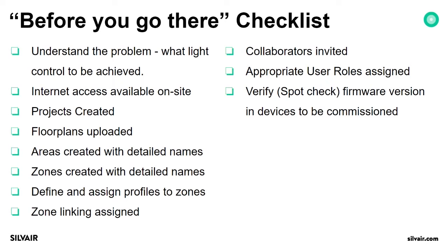Of course, internet access should be available on site all the time where you commission devices. Projects should be created beforehand. Most detailed floor plans should be uploaded to the projects. Areas should be created with detailed names, so that even by reading the area name, you will know what kind of functionalities may be inside.